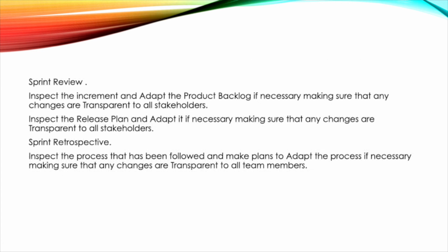Sprint review: inspect the increment and adapt the product backlog if necessary, making sure that any changes are transparent to all stakeholders. Inspect the release plan and adapt it if necessary, making sure that any changes are transparent to all stakeholders. Sprint retrospective: inspect the process that has been followed and make plans to adapt the process if necessary, making sure that any changes are transparent to all team members.